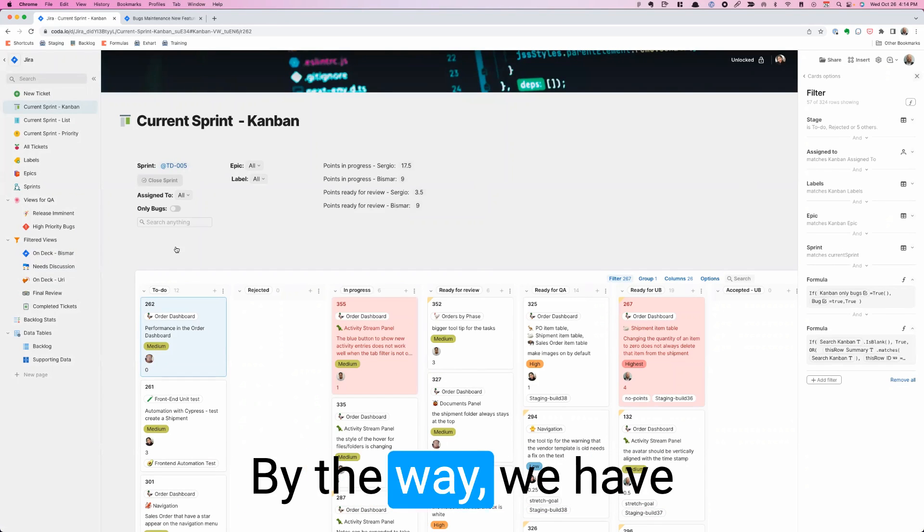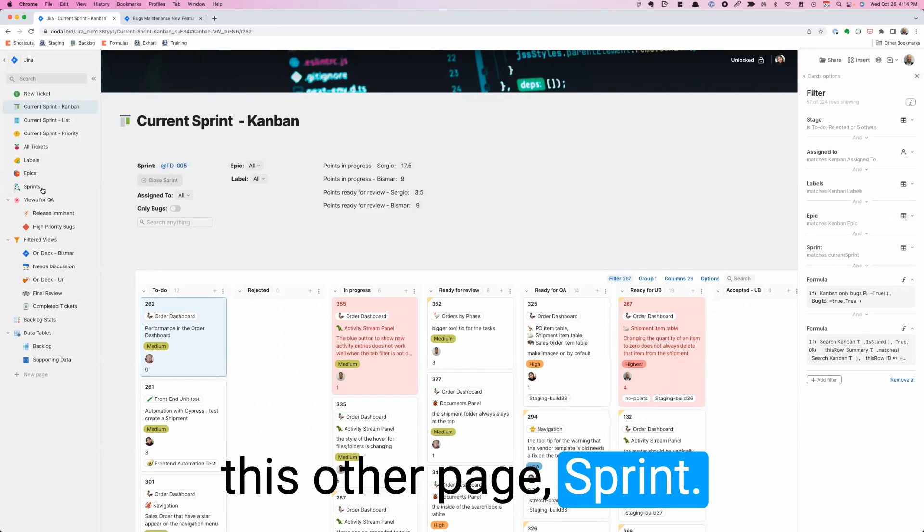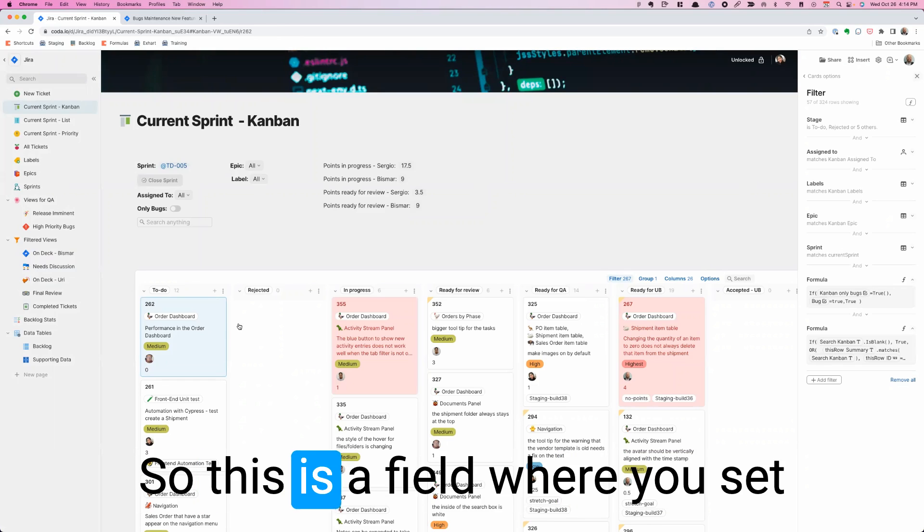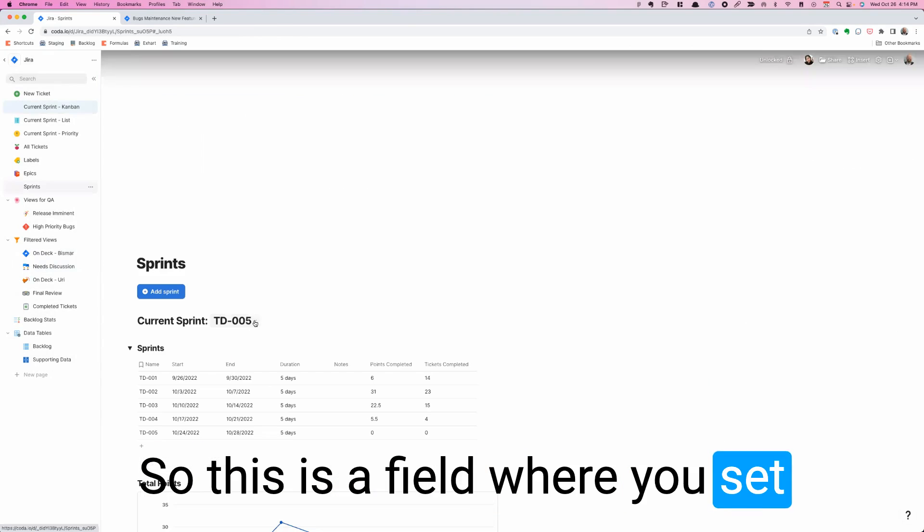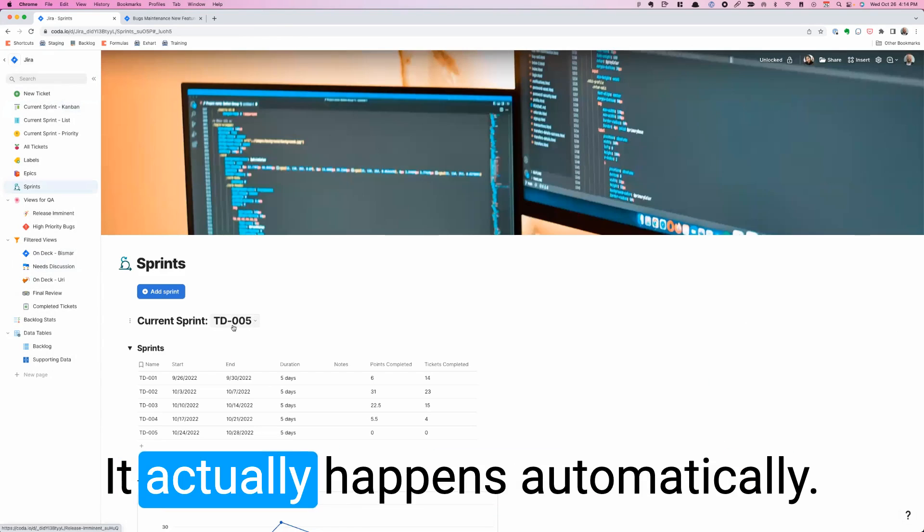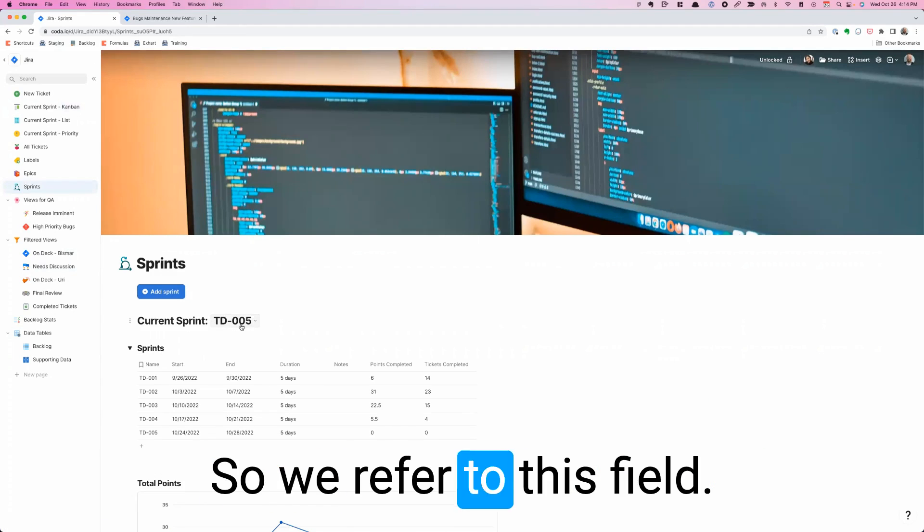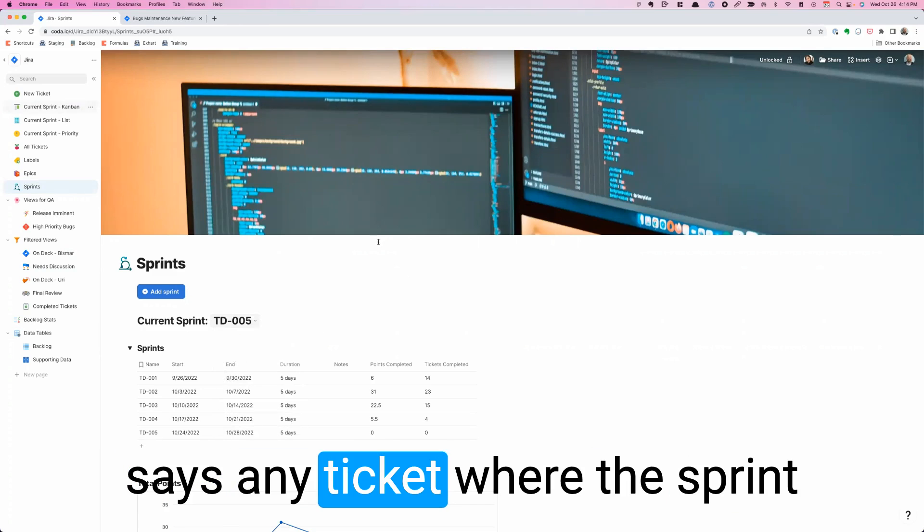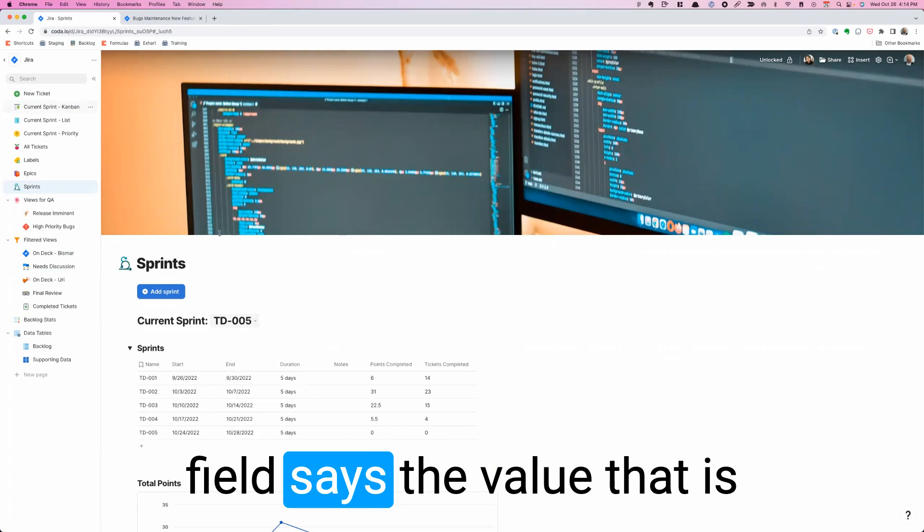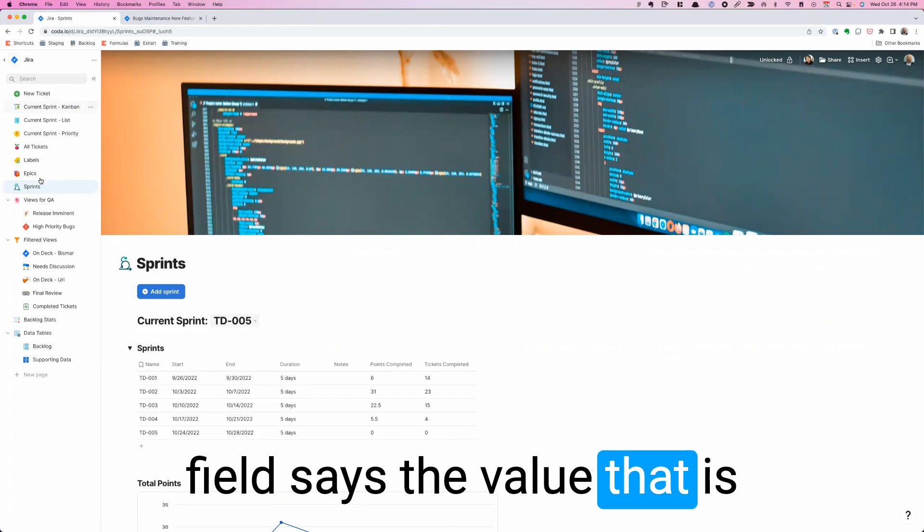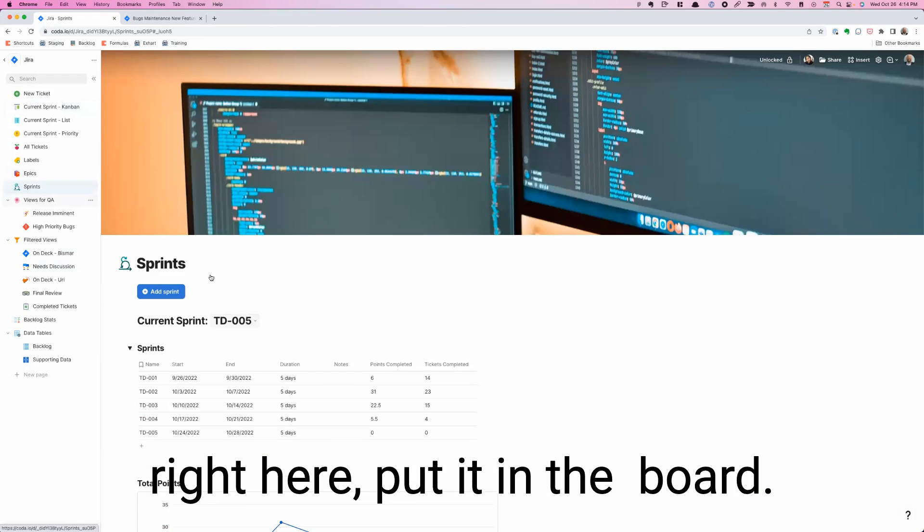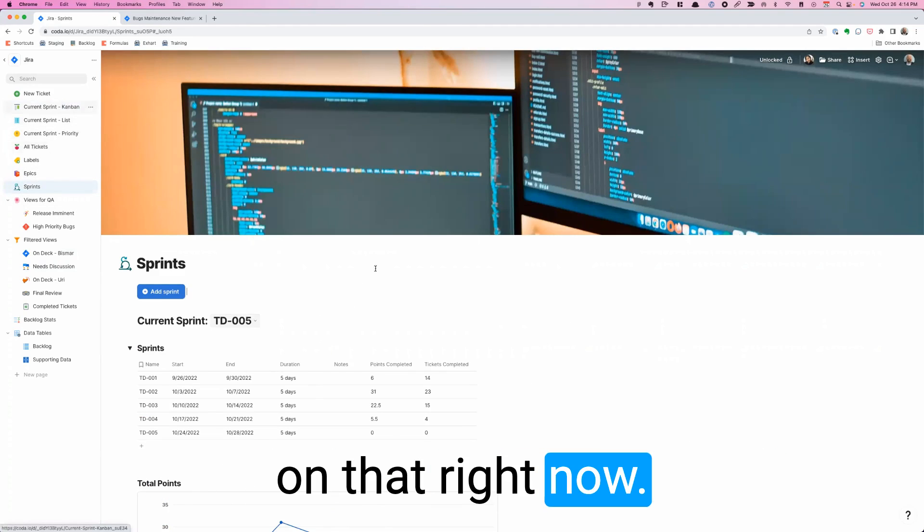Something really cool, by the way, we have this other page, sprints. This is a field where you set whatever the current sprint is. It actually happens automatically. What this page does is it says any ticket where the sprint field says the value that is right here, put it in the Kanban board because we're working on that right now. That just happens automatically.